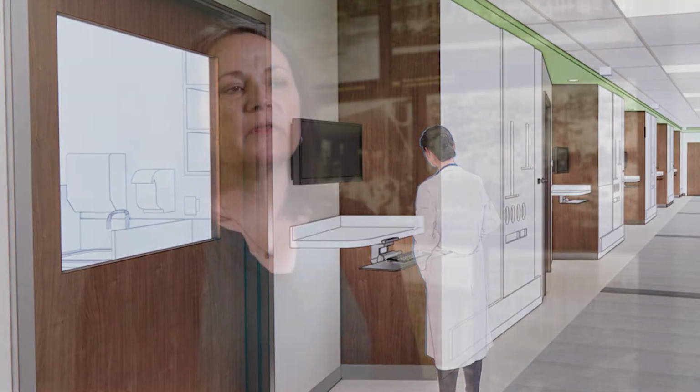With every decision that we make during the design process, we do like to understand what the cost impact will be, but also what the schedule impact would be. And of course, with everything that we developed out of our brainstorming sessions, there was a cost associated with it. We were to bring schedulers into the process to understand the schedule impact of some of these options, estimating resources to understand the cost of these, and builders, right, from out in the field to really understand how to make these solutions constructible.